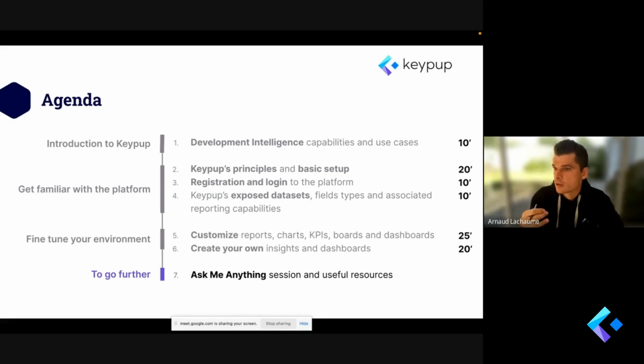Usually people will set due dates, be it a sprint due date or an issue-specific due date, on issues, usually not on pull requests. But if you want to understand how many pull requests are critical, it would be nice to infer the due date of a pull request based on its related issues. That's exactly what we do. When a pull request is related to one or several issues, we get the soonest due date and attach that as the pull request due date, which allows you to create reports of which pull requests are currently in review and overdue. That's another way we provide value through that association between pull requests and issues.